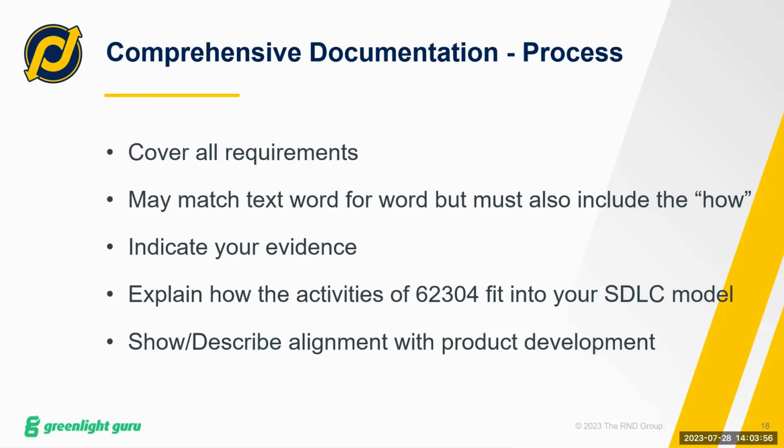And another really important reason for this is your design reviews. Some people use gates, but regardless, you have design reviews that happen periodically through your product development process. 62304 doesn't call out any specific design reviews that need to be held. So oftentimes those software documents are scooped up into the product development design reviews and become part of the certain gates that they have. So it's just really important that you coordinate the activities.